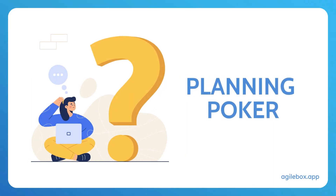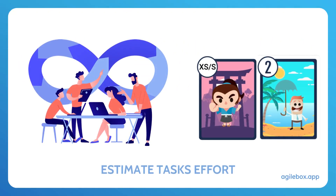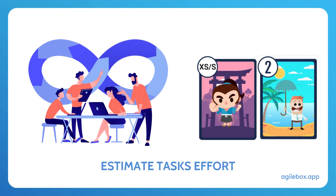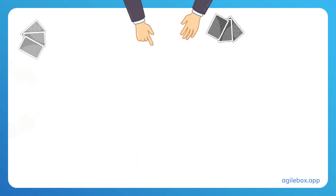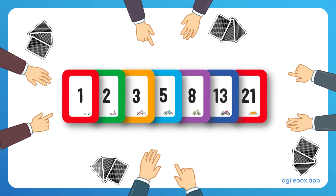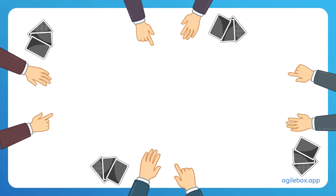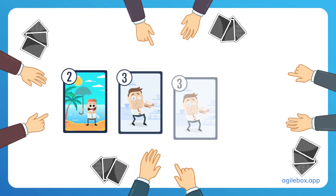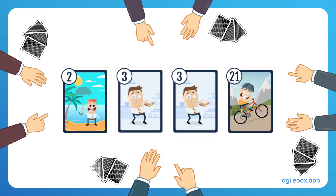So what is Planning Poker? Planning Poker is a simple method used by Agile software teams to estimate task effort. Each team member selects a card with a number on it that represents their estimate. The cards are typically based on the Fibonacci sequence, and team members reveal their cards simultaneously.